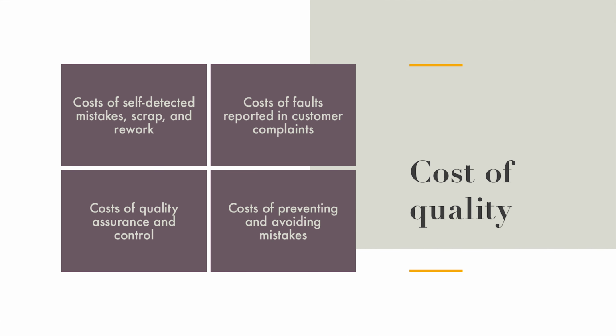Quality comes with a cost. There's a cost of self-detected mistakes, scrap and rework. There's a cost for faults reported in customer complaints. There's a cost of quality assurance and control. And there's a cost of preventing and avoiding mistakes. From this list, the first two can actually be handled by investing more in the latter two.